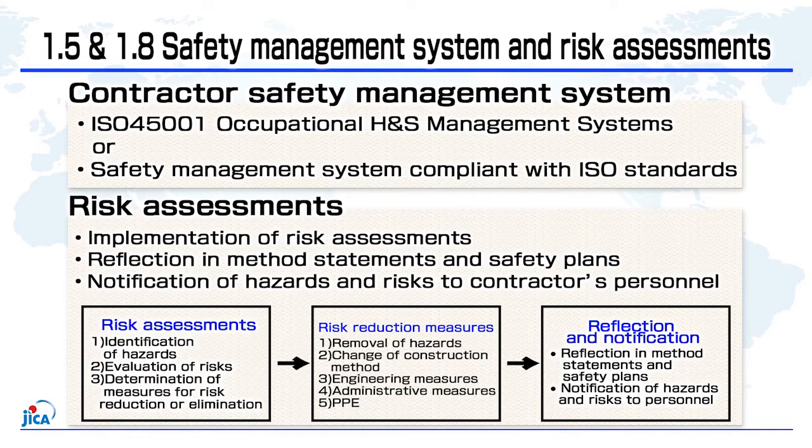Section 1.5 covers the use of a safety management system in accordance with ISO 45001, Occupational Health and Safety, or something similar to ISO standards, in order to improve the contractor's safety management level. JICA does not require external ISO certification.